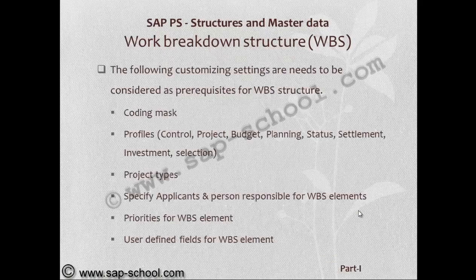The following customizing settings need to be considered as prerequisites for the WBS structure: coding mask, profiles such as control profile, project profile, budget profile, planning profile, status profile, settlement profile, investment profile, and selection profile, and project types, specify applicants and person responsible for WBS elements, priorities for WBS elements, and user defined fields for WBS elements.